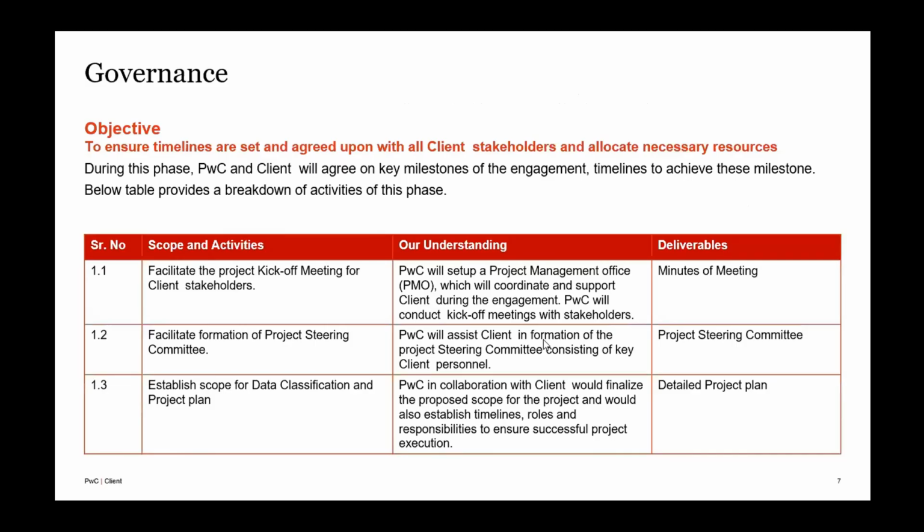So, okay, these are the step-by-step work that we would do, and I would just go through what kind of deliverables we would give at each and every stage that we were talking about before. So if you take governance, initially there will be a kickoff meeting with the stakeholders, and minutes of meetings would be shared. Then we would require the organization to appoint a steering committee to run this engagement, and then we would establish a detailed project plan, which will be given to the client.